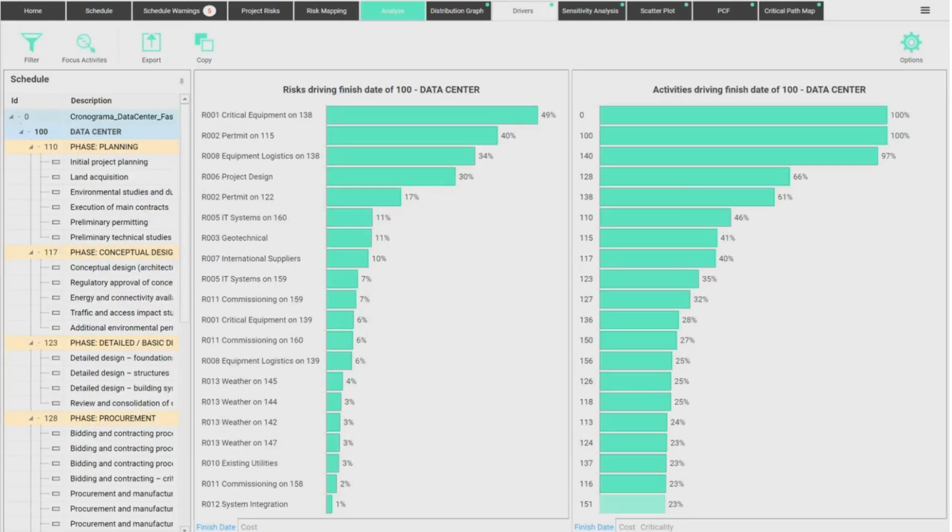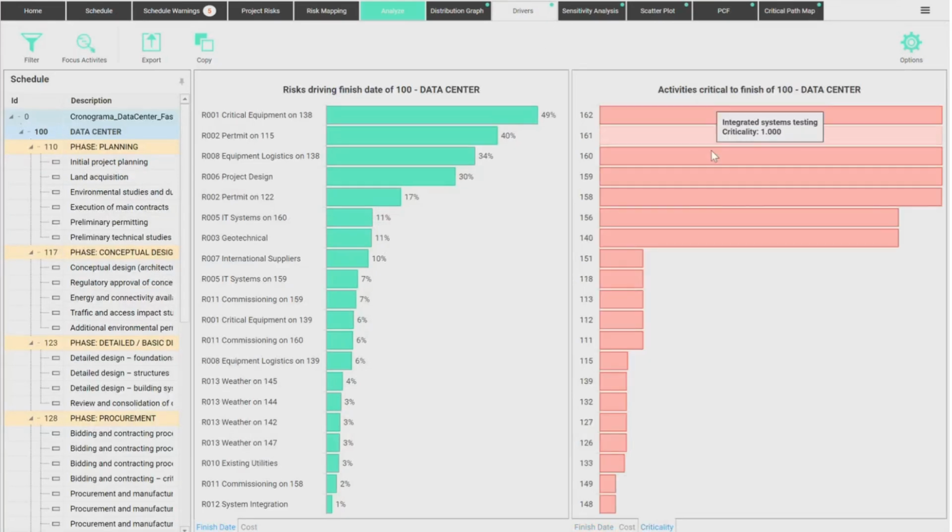Then when you look at the criticality, you will see that some tasks are on your critical path most of the time. Some tasks are almost never on your critical path, and some of them are never, ever on your critical path. So you should focus your risk analysis efforts on understanding these tasks at the top, and then figure out which risks from your environment could affect them, and then model those. That would be the prioritization of your available time as a modeling resource. Sometimes people do that.